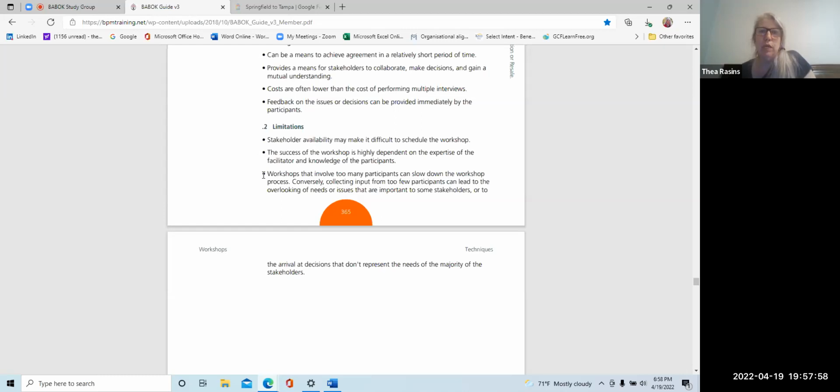It's very important that you get the critical people to attend. The only way I've been able to get critical people to attend is to get their management on board. If their management is endorsing it and saying it's important you attend, I need you to be there, they'll be there. But without that, they have no reason to step out of their work life and come and participate in this thing that they may not even understand what it's for.